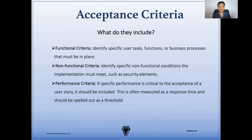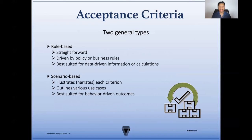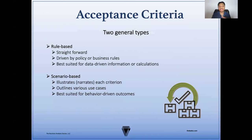What does acceptance criteria include? You should typically have functional criteria, non-functional criteria, and performance criteria. Functional criteria identifies specific user tasks, functions, or business processes that must be in place. Non-functional criteria identifies the specific non-functional conditions the implementation must meet, such as security elements. And for performance criteria, if specific performance is critical to the acceptance of the user story, it should be included as well. This is often measured as a response time and could be spelled out as a threshold. There are generally two types of acceptance criteria: rule-based and scenario-based.